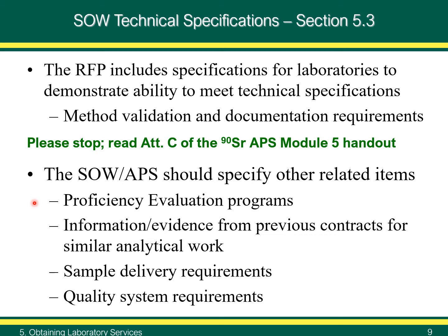Although each laboratory's responsibility is to ensure that PT programs maintain proper accreditation, projects should also verify the accreditation status of laboratories they use and whether the PT program is technically applicable to their project. SOWs and APS may also include requirements to provide evidence that the laboratory has previously performed work under similar contracts in the past.